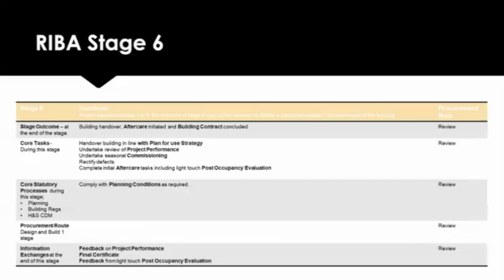You might have a snagging list here where you've got some defects, as I mentioned earlier. They won't necessarily stop you from occupying and using the building, but it might be fixing a bracket, or one of the taps isn't working or something like that, but it doesn't actually stop you from being in the building. But there's a post-occupancy evaluation at this stage in the handover.